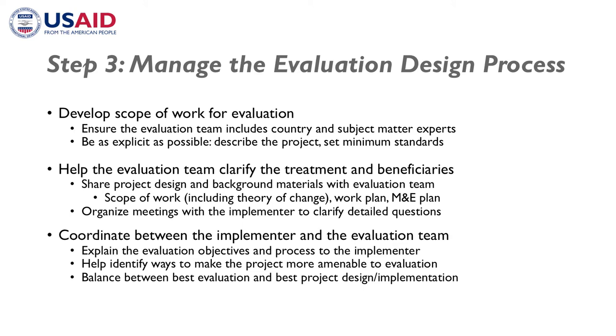A number of our implementing partners have never been through an evaluation, or at least an impact evaluation, before. And so one of the things that we found is really important up front is just to make sure that everybody is on the same page about the objectives of the evaluation process, and what that means for the implementer and their implementation timeline. And that's things as basic as making sure that the specific activities that we seek to measure in the implementation don't start until after the evaluation team has been able to collect baseline data.